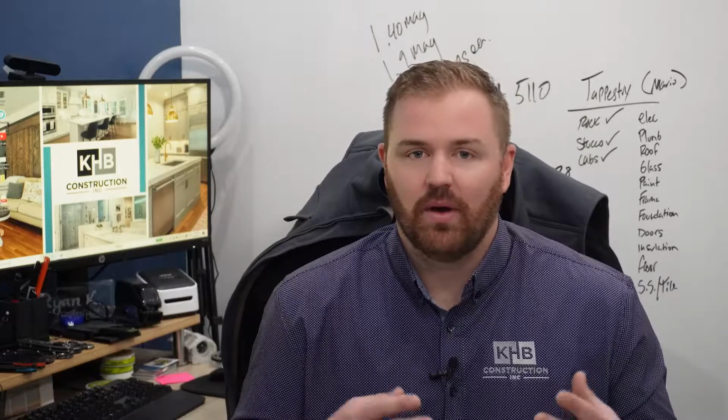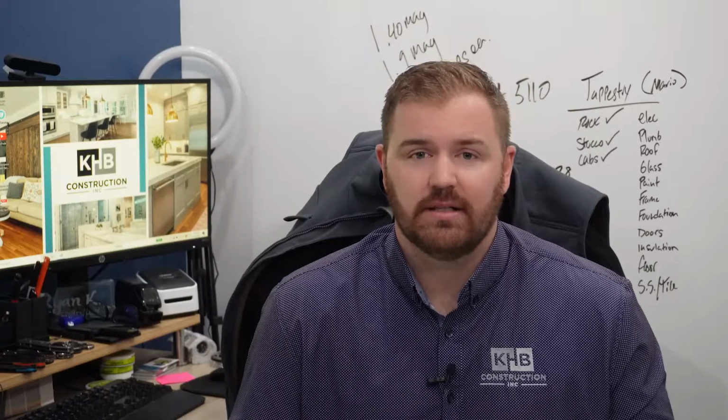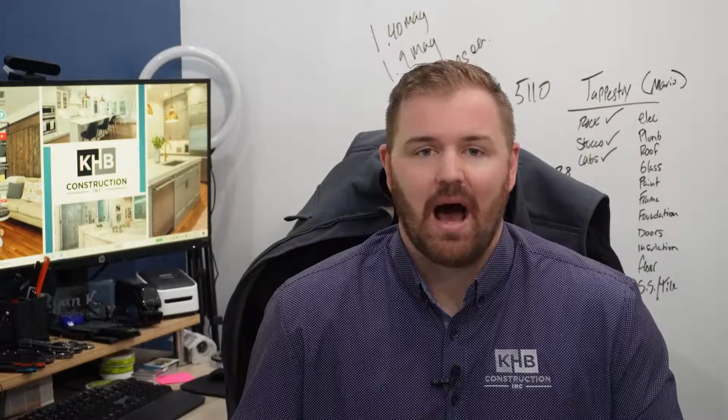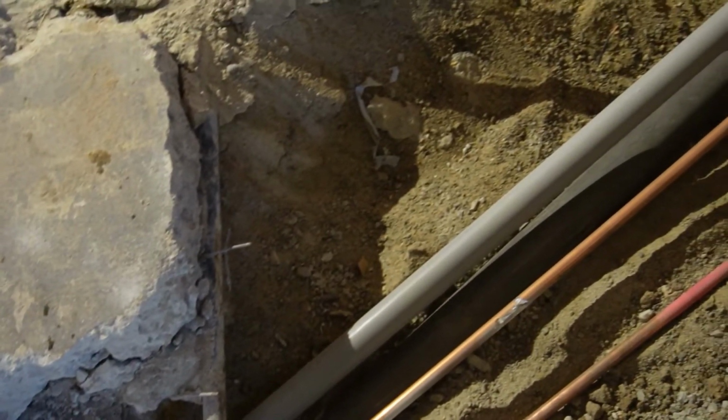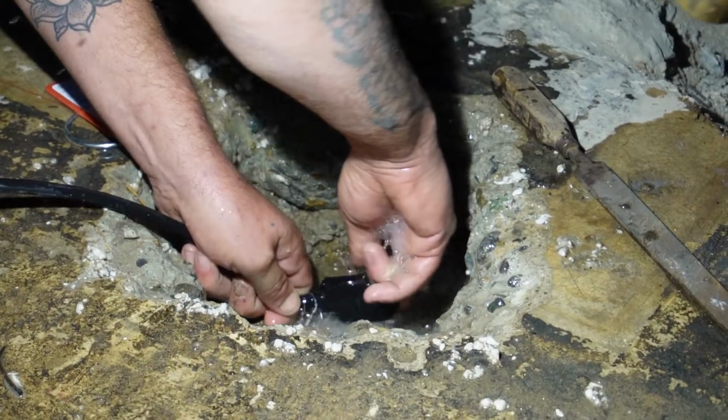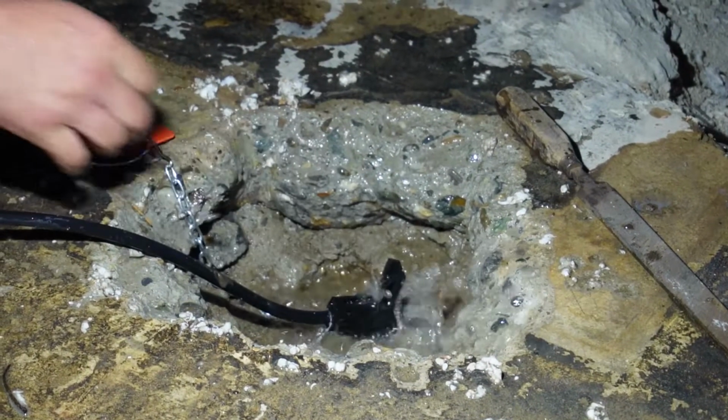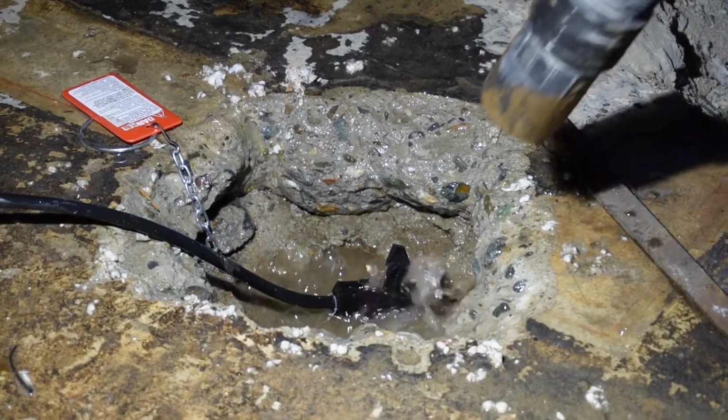And so, at least with us at KHB, a change order is usually pretty minor. We're pretty thorough on the front end of projects to get everything hashed out. And let's say we open up a subfloor and the plumbing takes an hour longer than it should because it was plumbed originally in a funky way. We're not gonna change order you. We're not gonna penny pinch 1 to 3 hours. It's a renovation, it is what it is, things happen.